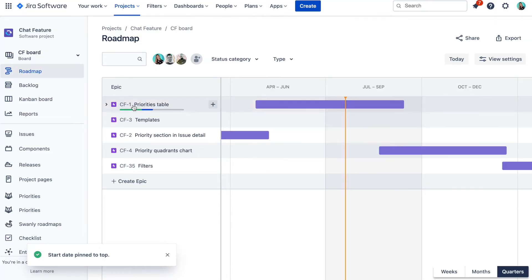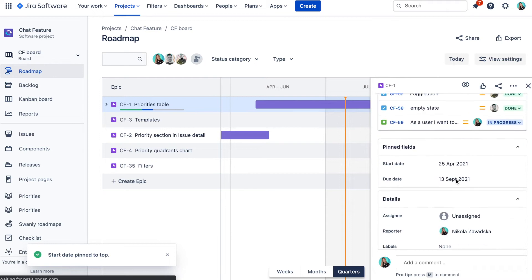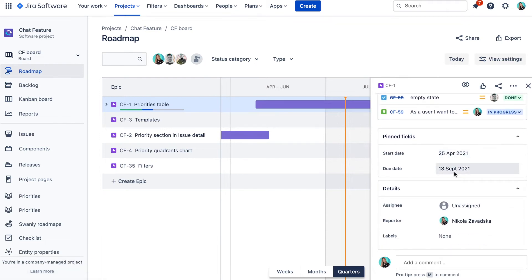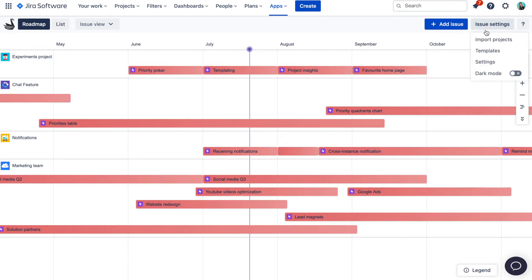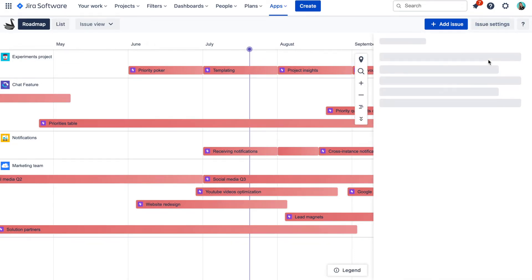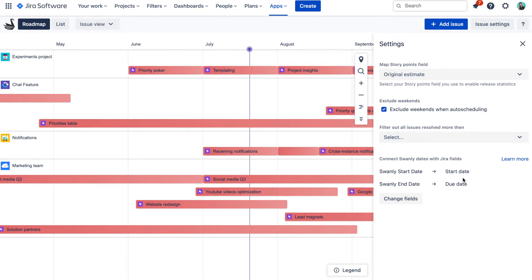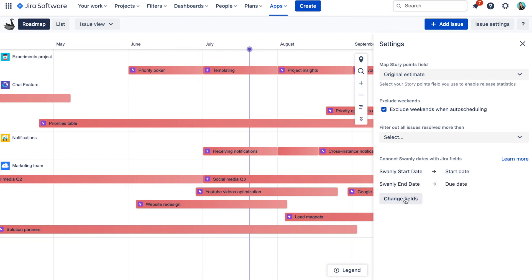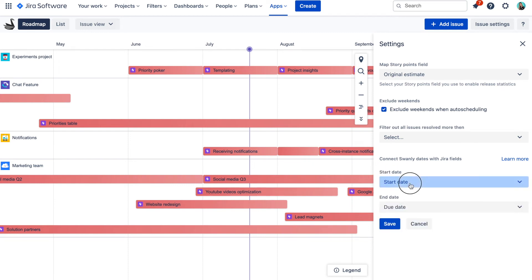Let me quickly explain how this works and how to change the Swanly settings to use dates from different Jira fields. Jira project roadmap stores its dates in custom fields called start date and due date, and Swanly works with these dates to render the roadmap as well. This is all done via settings in Swanly where you can select what custom fields will map to start and end dates. After you install the app, start date and due date custom fields will be selected by default, but you can always change that to any other custom field which has a date format.